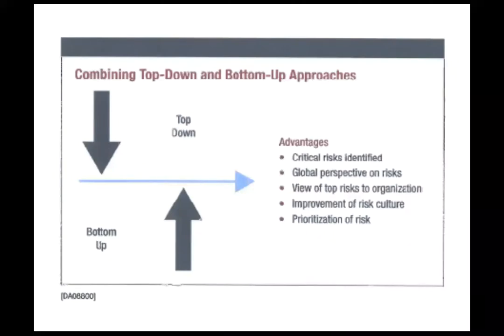And then the other real benefit of this is if we do it the right way, we're going to have prioritization of risk. What my experience has been, and others that I've talked to that have done consulting for years, is that we tend to identify lots of risks and we'll do these risk registers, and then we don't do anything with it. We don't prioritize what's the next step to make sure we actually address those risks. And the reality is when we identify 100 things, we're not going to be able to do all 100. And so the prioritization is really key. And that's why as we start going through some of these different tools and use some of the case study, I think it'll be really helpful for you.